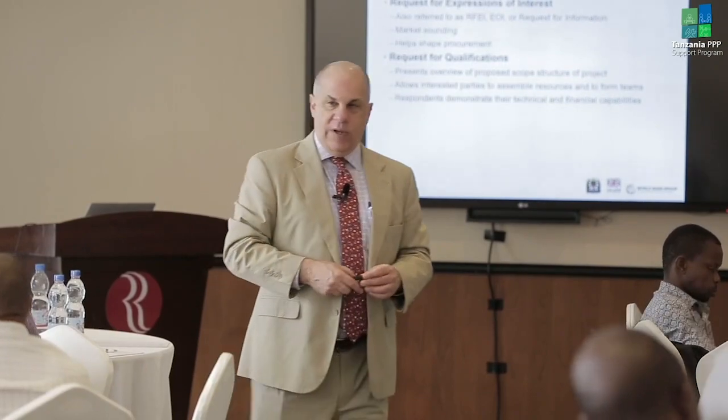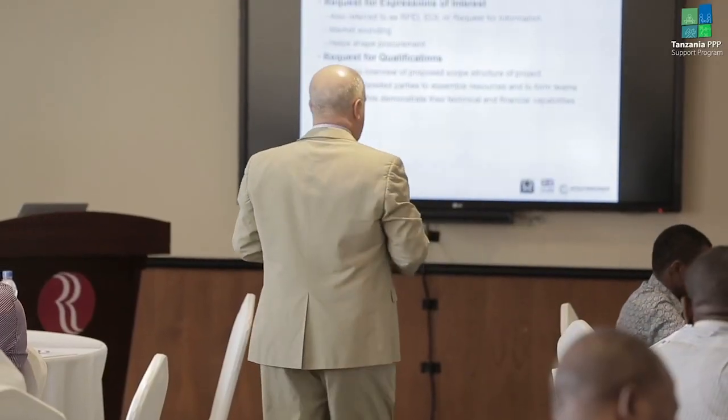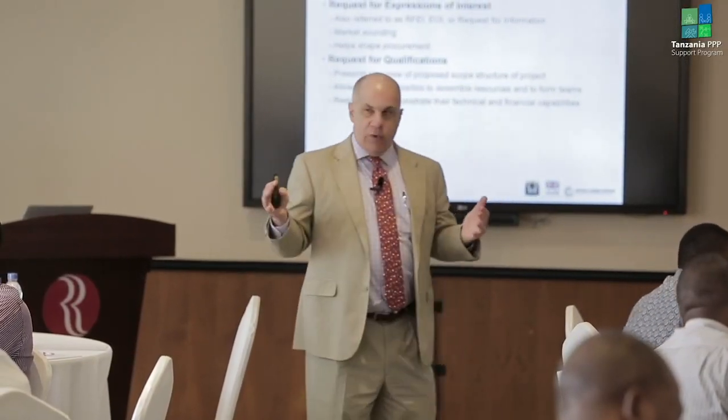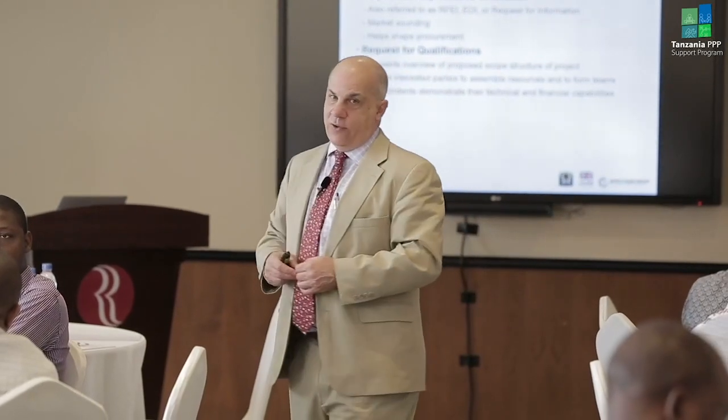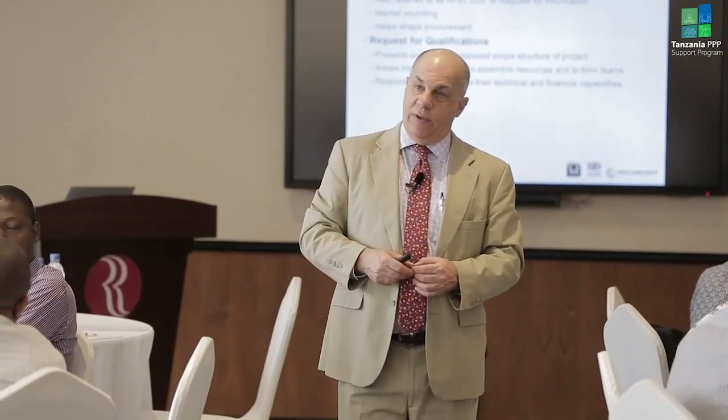Okay. Request for qualifications. I'll describe it. Usually the RFQ, as it's referred to, will present a brief overview of what you're trying to do, what the scope of the project is. They will provide what we call an SOQ, Statement of Qualifications, which will highlight their experience, their technical capabilities, their financial capabilities.